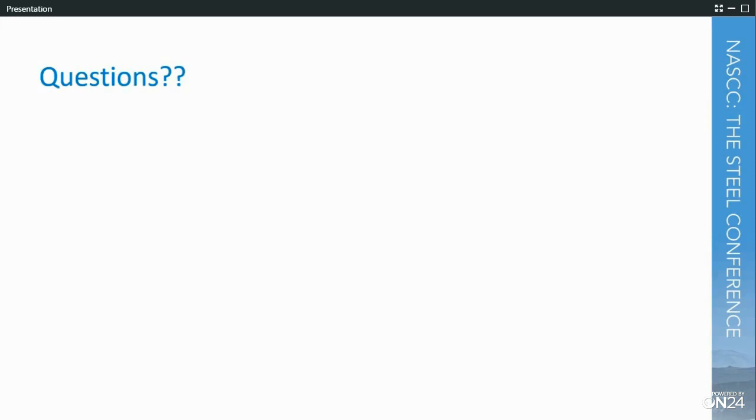I'll jump in. The production office tracks that, so our cut list will have that information. There's stuff in Strumis that will say this, and I forgot to mention that in the Access system we do have notes. When they're at the plate processing workstation, there is a note, and we will mark it saying, hey, all materials here. But most times the production office controls the initial release of cut lists, so they know where material is at, and they're tracking that. That helps when the scheduled dates are getting put in on the front end.